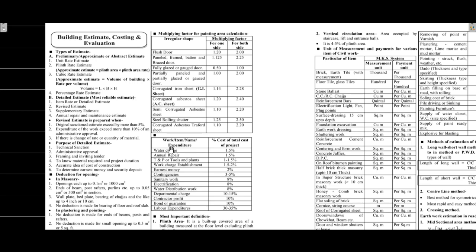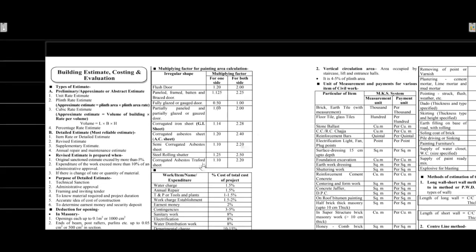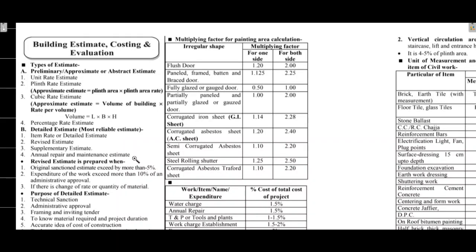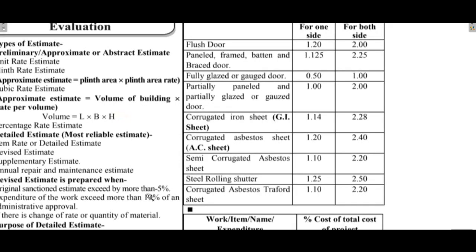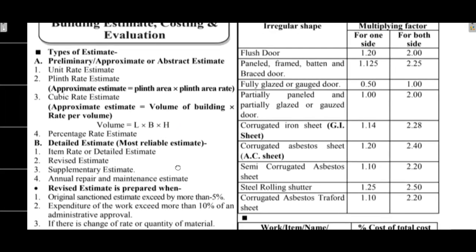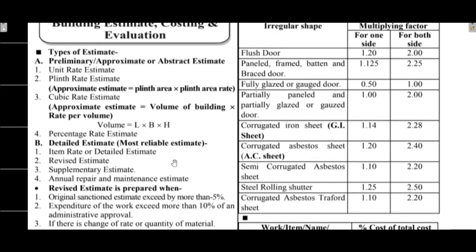First, Estimate and Costing Evaluation. The first point is the type of estimate. The first is the detailed estimate. The second is the preliminary estimate. The word itself is preliminary - this is basically abstract or approximate estimate. It is not accurate. Detailed estimate is the most reliable estimate. It is accurate.